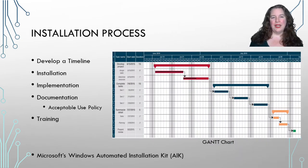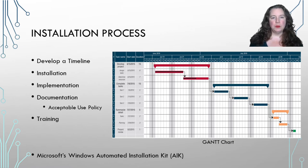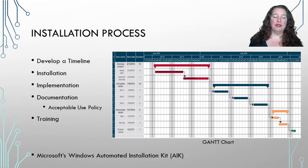When you're ready to start the installation process of your new network, the most important first thing is to develop your timeline. You're going to build a chronological list of what's going on from start to finish: organizing, designing, installing, implementing, documenting, and training — five or six steps covering everything that needs to be done to install your project.